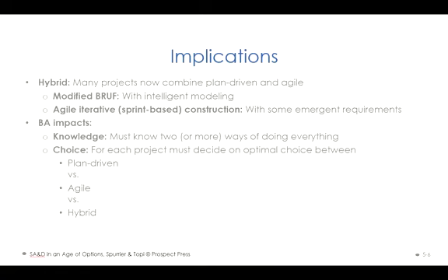Now, in the IBM Rational framework, there is an architecture or so-called methodology called the Unified Process, and that Unified Process is basically a type of hybrid methodology. Hybrid methodologies usually have a set of so-called big requirements upfront that drive the entire project planning. But in between, they allow some of the requirements to be modified through iteration, so you can have smaller changes in the process of implementation or design.